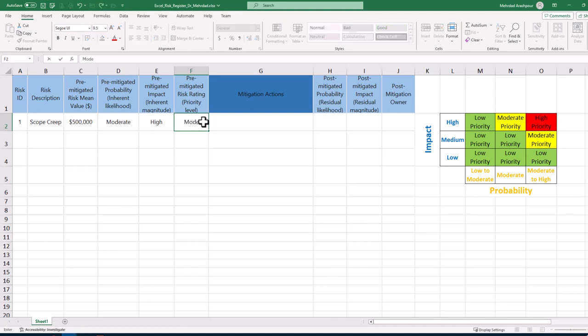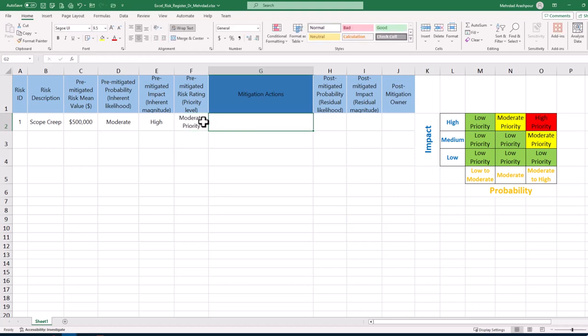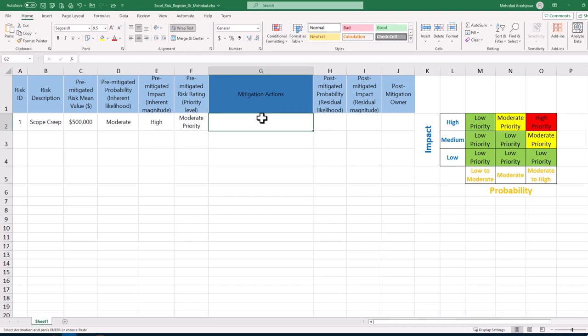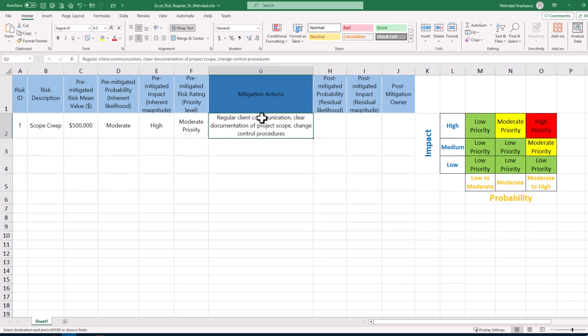Finally, risk rating or priority level which is a function of impact and probability is defined based on the risk matrix on the right hand side of the screen. Next column is related to mitigation actions which are proactive measures taken to reduce the likelihood or impact of identified risks.